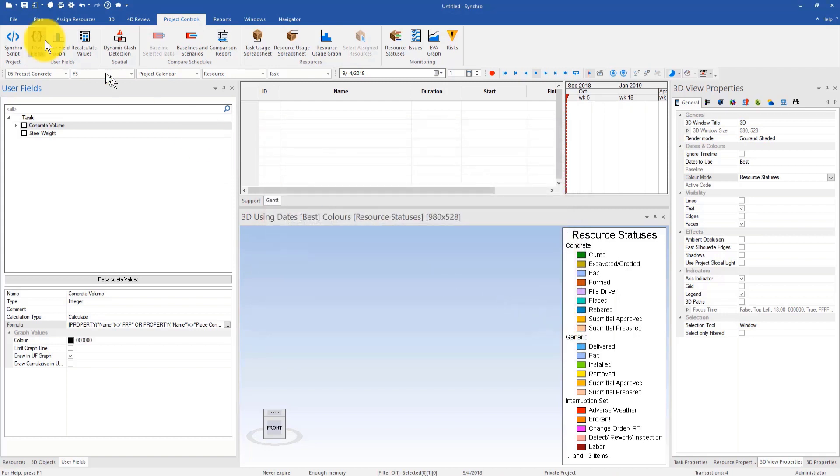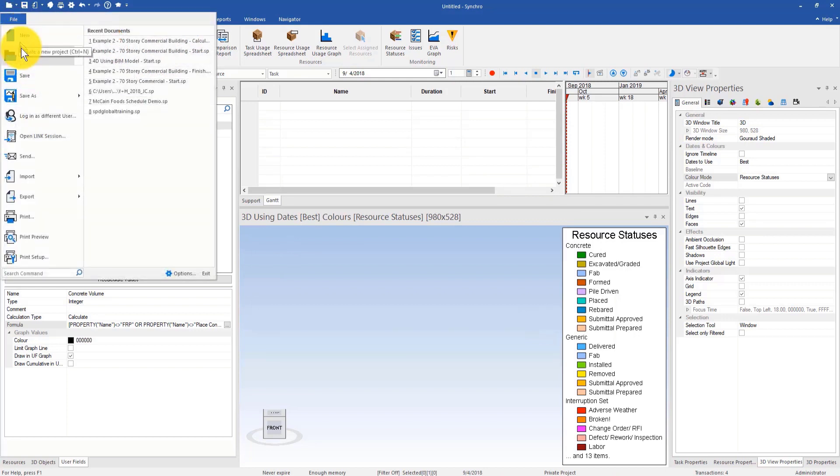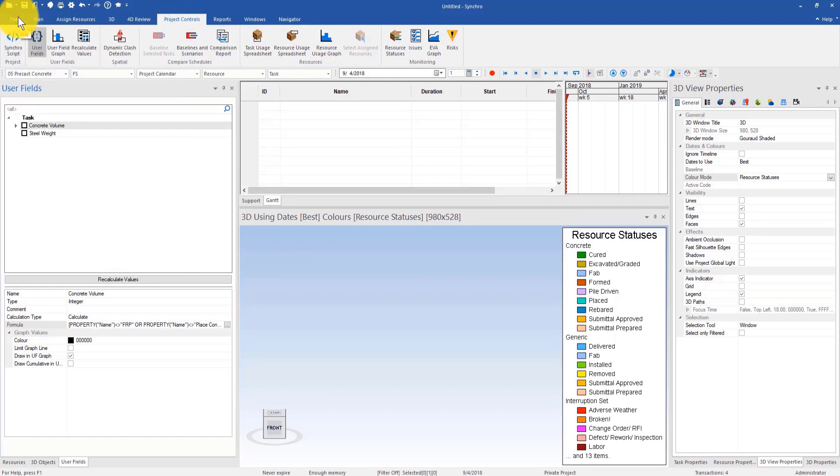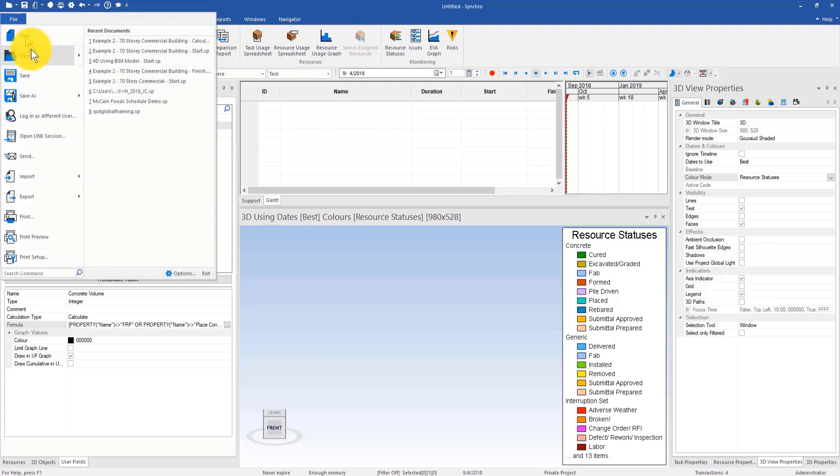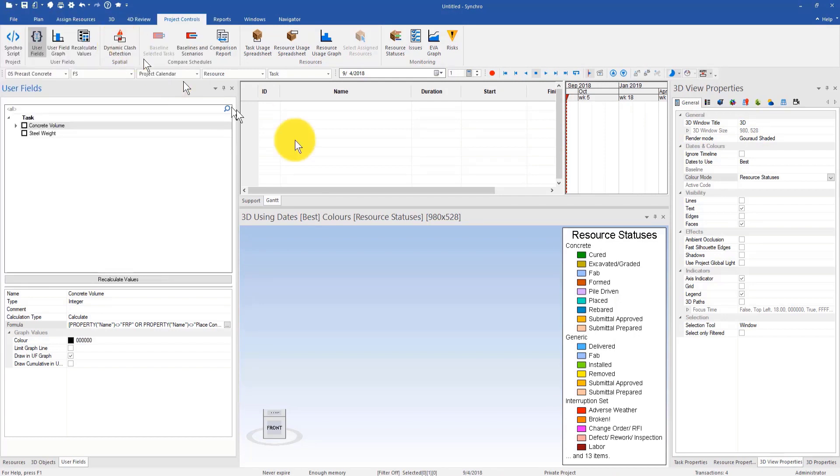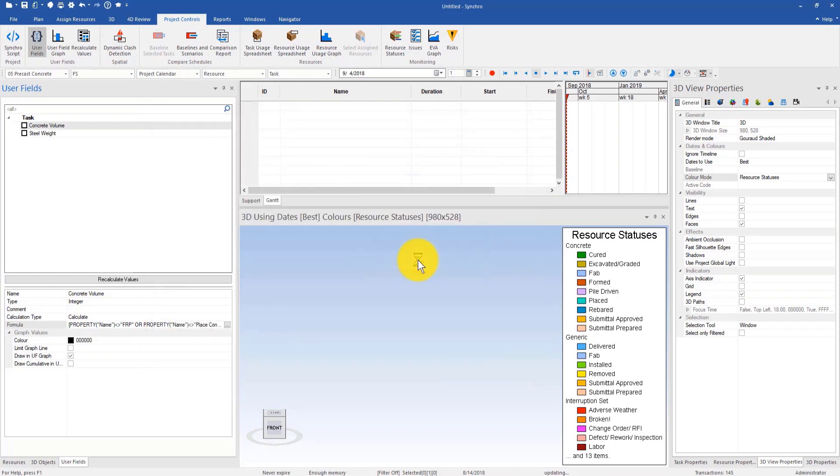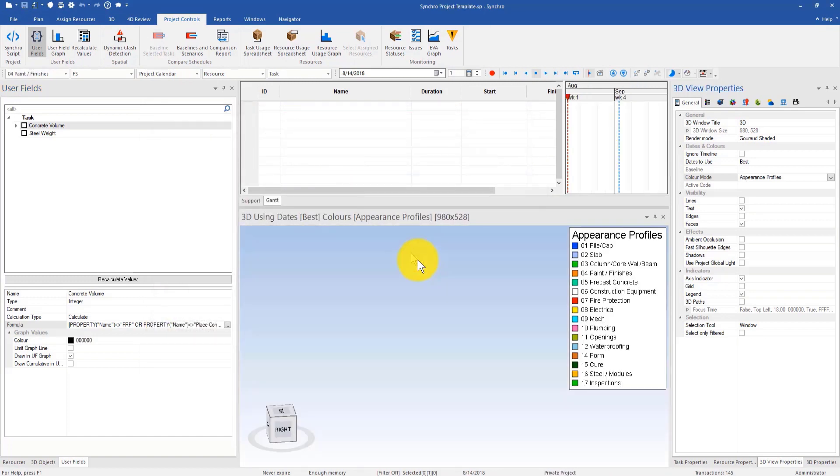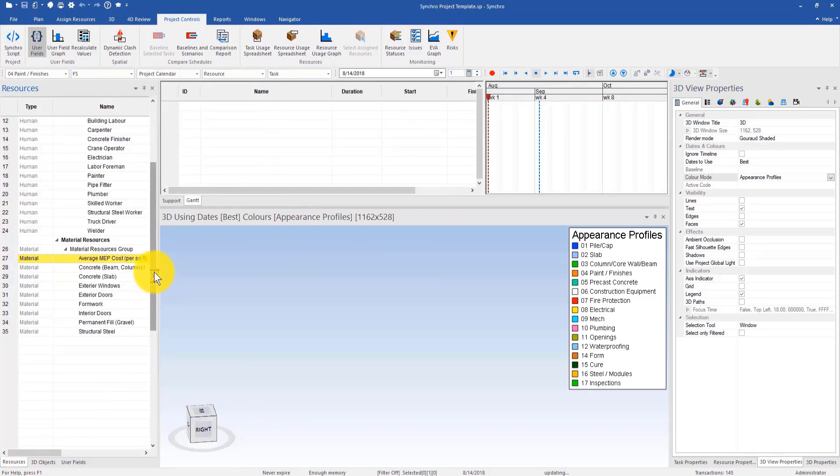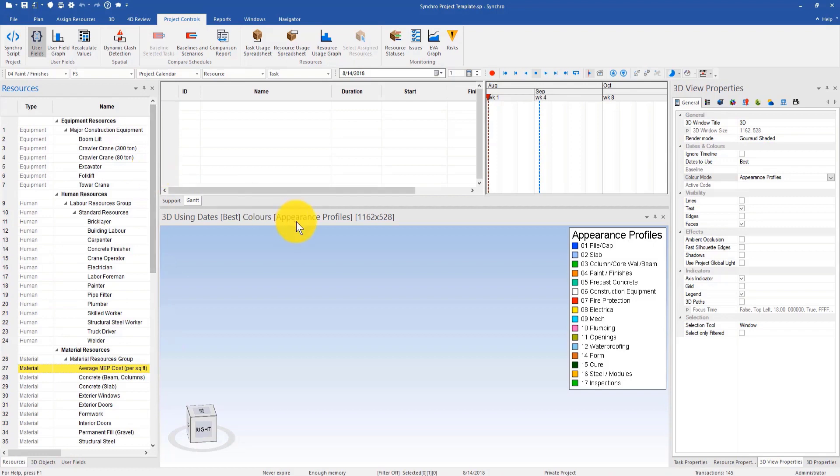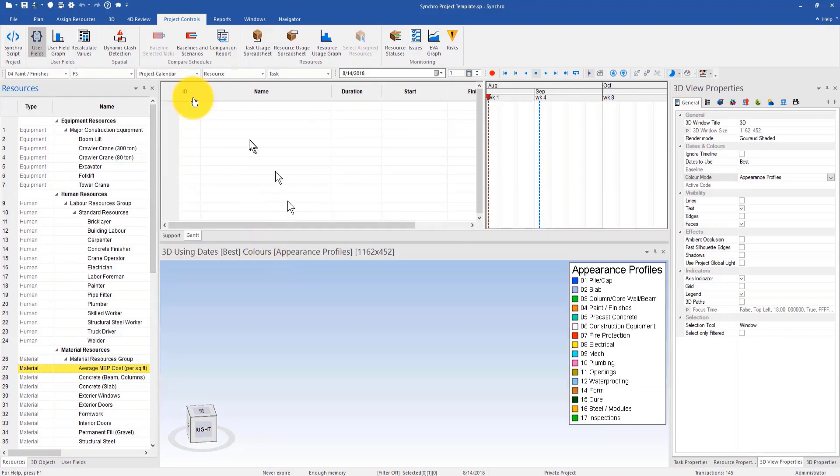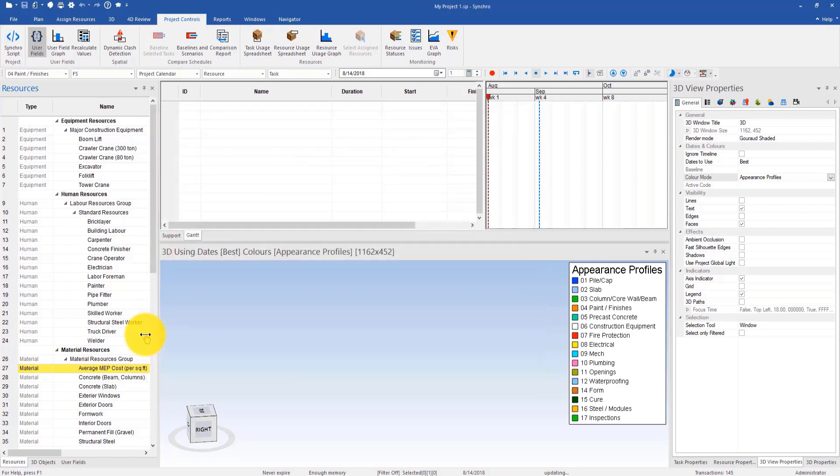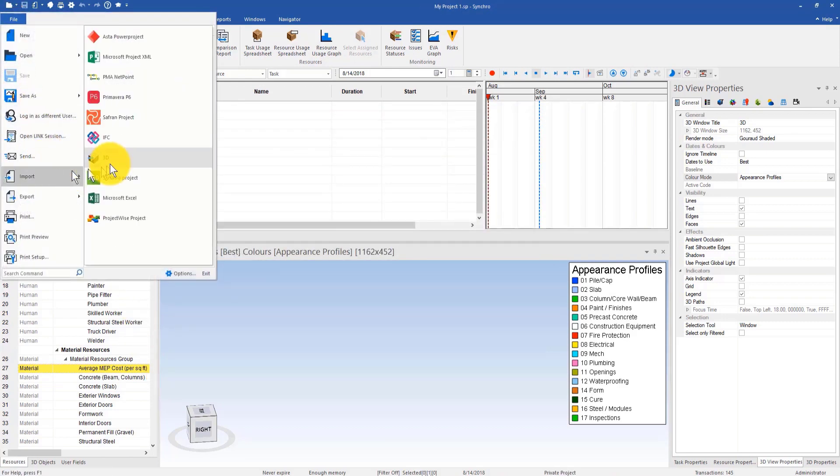Of course you may say, the best way right now when I start on a new project, instead of importing everything one by one, how about I just import my Synchro project template and go from there? Of course you can do that. As long as you need all of the information from a Synchro template project, you can start with a Synchro template project and then do save as and call this project my project one or something like that, and then just save. After that you can start to import your models from Bentley, from Autodesk Revit or Navisworks and all that.